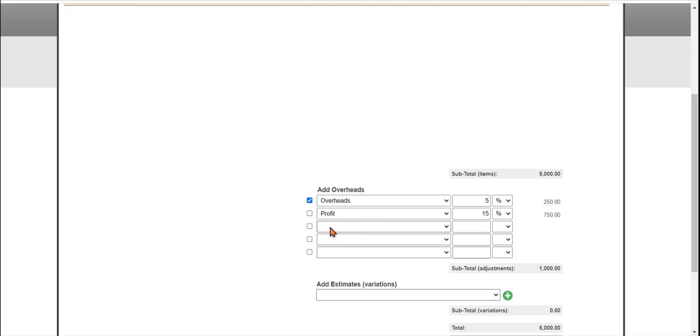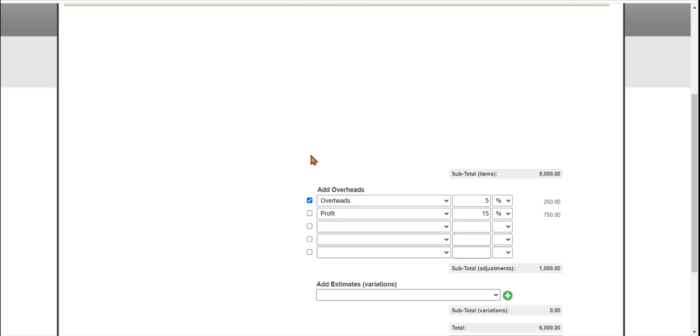We can also add our location cost factors in here and from the within reports whatever's in this box will take the amounts here and distribute it throughout the whole estimate. You can also choose to separate it and if you do a within report and you decide to tick the box here whatever you tick on the box will stay separated from the rest of the estimate.